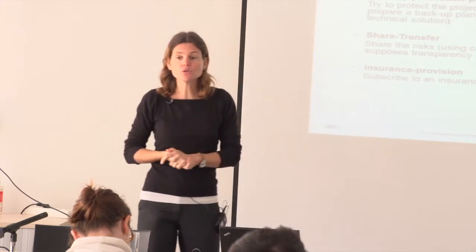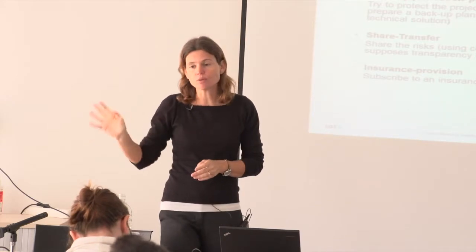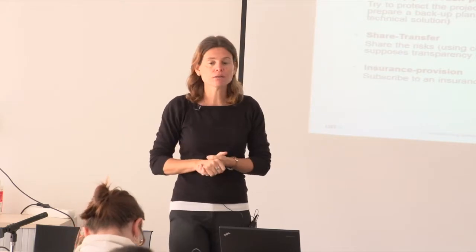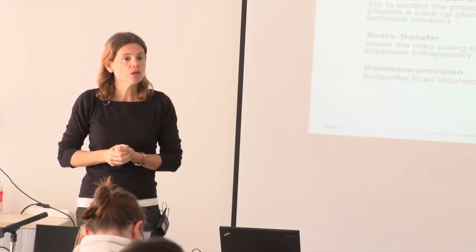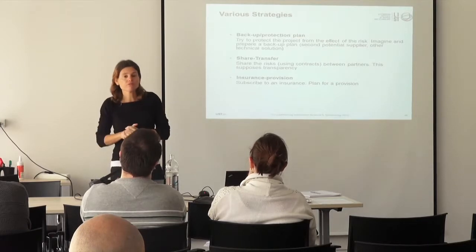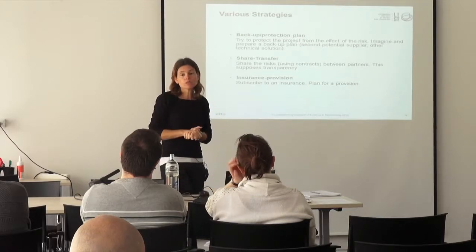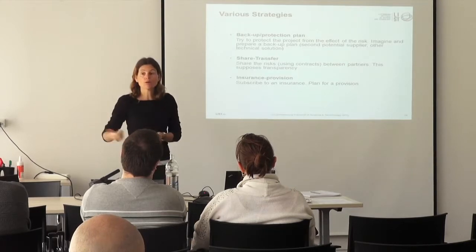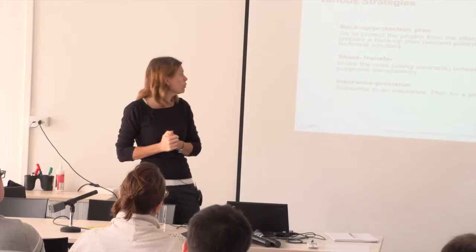For example, if you're not really sure that your supplier will last the entire project and be able to deliver, say, 10 or 100 pieces of equipment, maybe find a second supplier. You've started already discussing with that second supplier, and maybe have a contract that you can activate only if the first supplier is not working well.